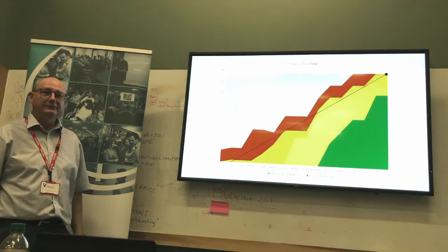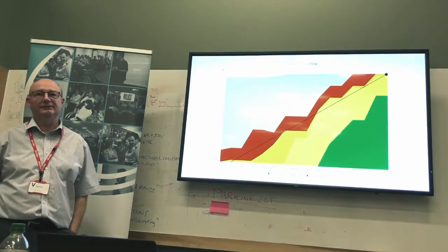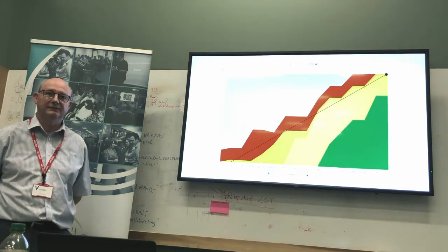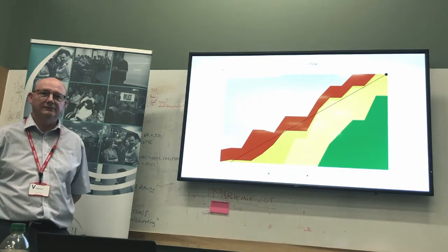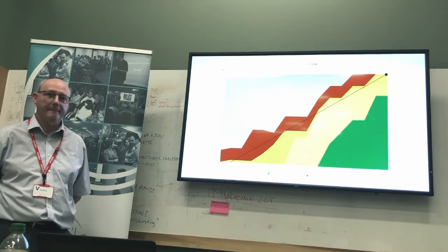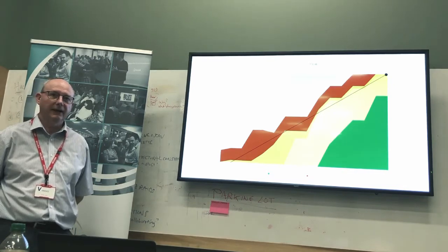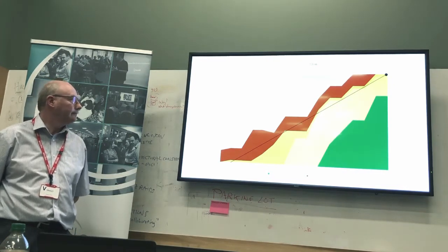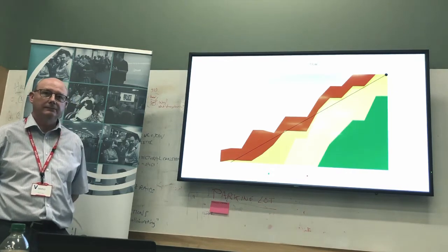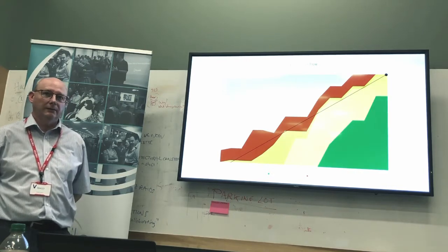It depends on the context, because there might be part of that story where they would need to run many reports, and it might have a knock-on effect to many different systems. Whereas if you've got another story in the same area, it might be more efficient if they were both done at the same time, because you wouldn't have to redo the work. Say you've got a regression pack of 5 days. If you run one story through, you would have to run 5 days of testing. If they run 2 stories by waiting an extra day, it's still 5 days' worth of testing. It really depends on how much effort is required to test that piece of work based on the change.